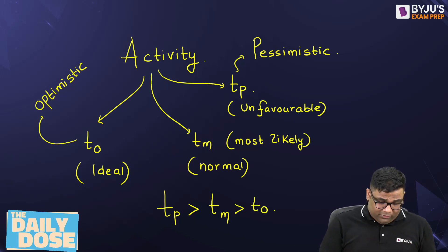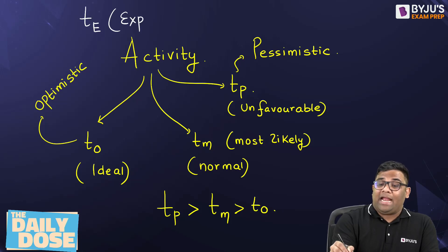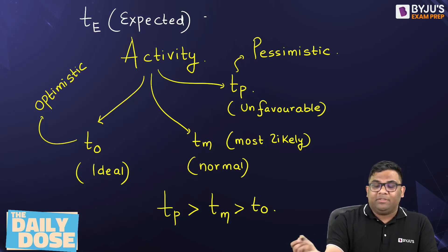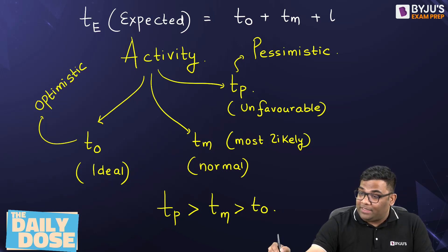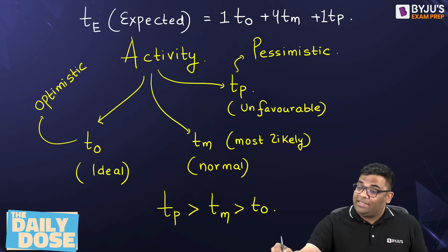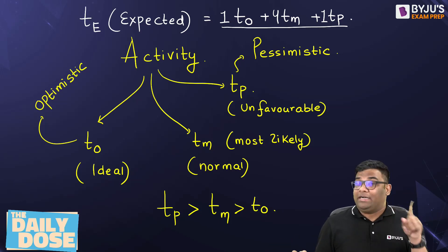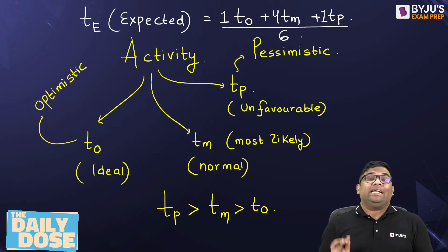Now, if I want to find out the expected time Te, the expected time of the activity will be an average. I will take T0, Tm, and Tp, but I will give different weightage. I will give one weightage to T0, one weightage to Tp, and four weightage to Tm. So total weightage is 1 plus 1 plus 4, that is 6. So Te equals T0 plus 4Tm plus Tp, divided by 6. This gives the expected time of a particular activity.